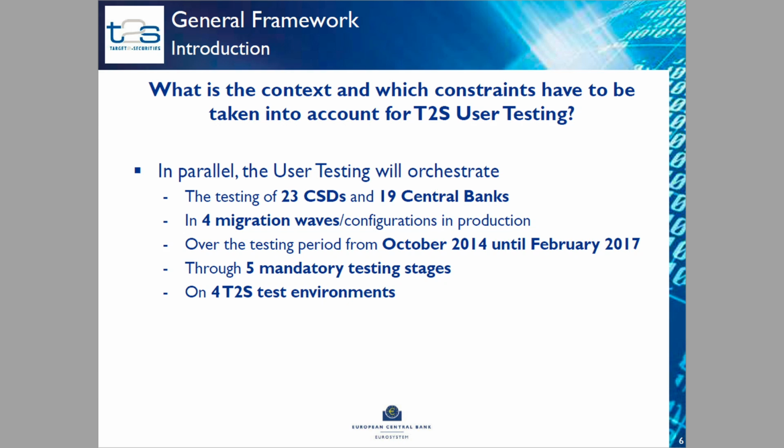We have the testing period from October 2014 until February 2017. That is from the first testing time, the start of user testing, until the end of migration wave 4. Of course, if there will be contingency, then we have to see how we fit everything into this picture, which means it's in total 2.5 years.